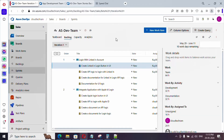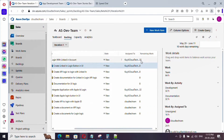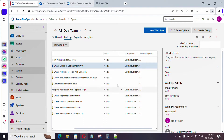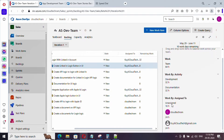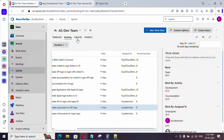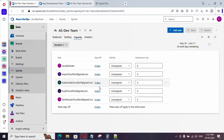Click on Work Details. We are in the backlog part and will cover the task board later. Under Work it is showing 64 hours — if you add up the remaining work for both user stories it comes to 64 hours. We have both development and documentation effort. For development it shows 32 hours across those tasks, and for documentation we have four tasks totaling 32 hours. Unassigned work shows 16 hours, one person has 24 hours, and another has 24 hours.